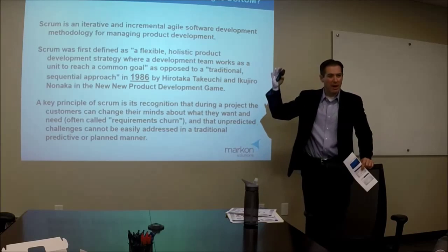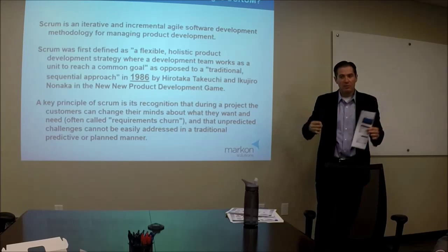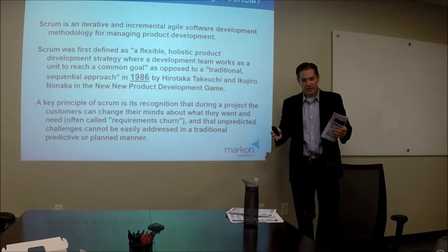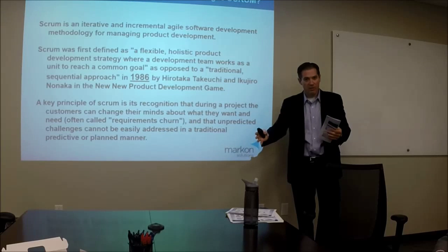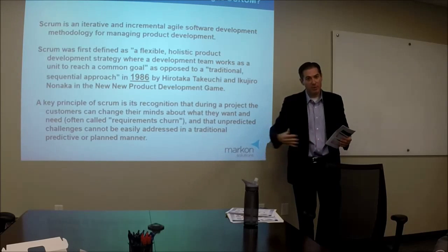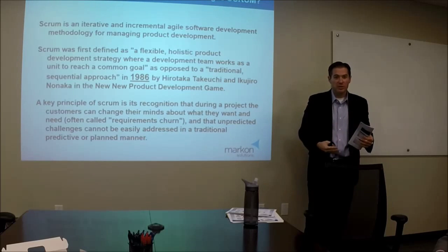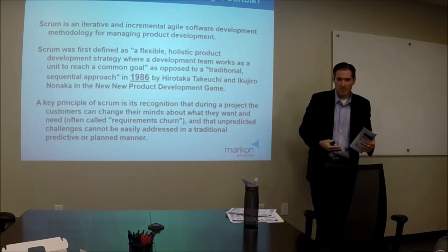You didn't pay a lot of money to change it from blue to green. When you move the building foundation 10 feet over, you're putting lots of money in there. You want to get that right the first time. You don't want to have to rework it in iterations. See what I'm saying?